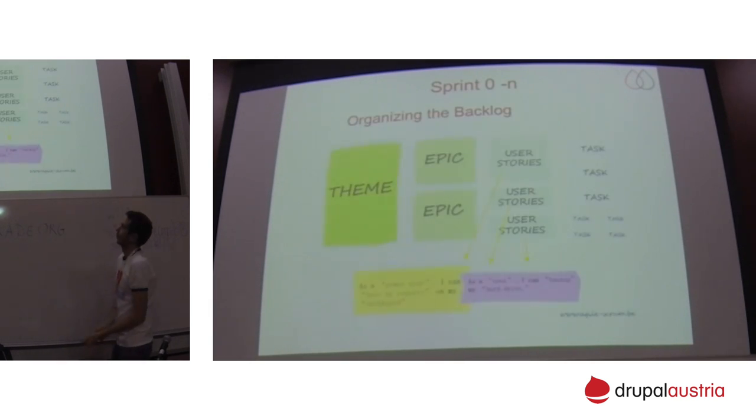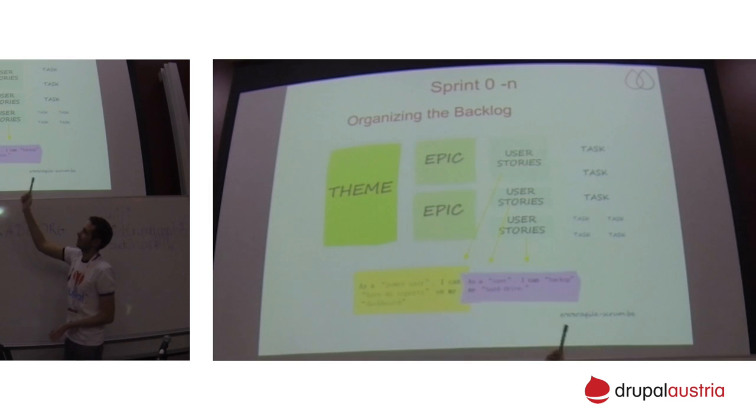All right, so here's just an example, a really good one that I found on the net, of how you can structure the user stories in order to avoid user story blindness. I guess that most of you should be aware of that one. But just quickly, you can specify a team. Then you might break down the team into epics. For instance, epics might be all content types, or, if you have a commerce site, the payment flow. And then from these epics, you might break down the epic into user stories and then into specific tasks. So this is something that works for me. But I'm using epics, user stories and tasks. So far I skipped the team part because maybe we didn't have such big projects.